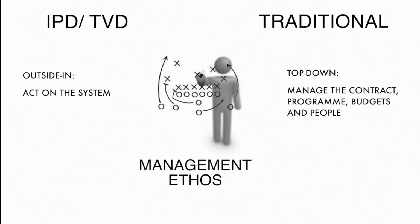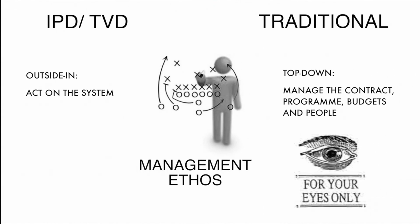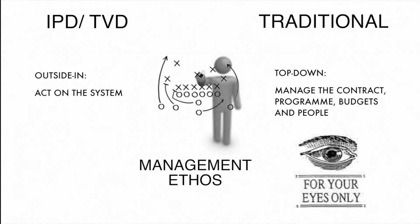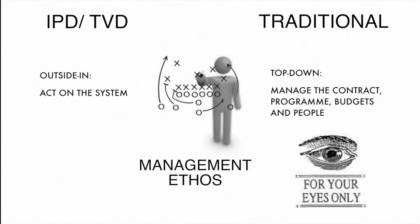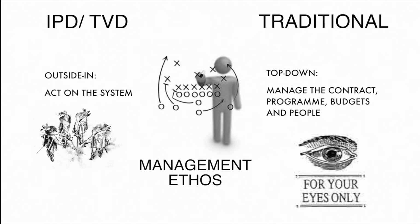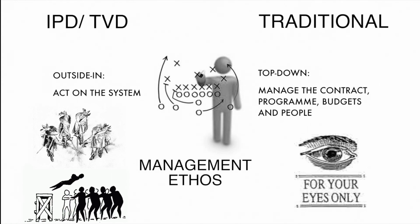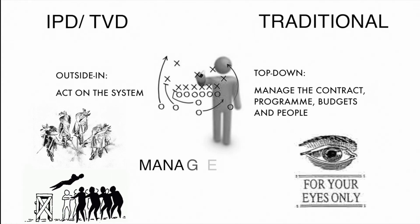Traditional construction project management is focused on a need-to-know basis, where everyone need only know what their specific role requires of them. This leads to interdisciplinary clashes at design stage and costly problems on site where no one takes responsibility. The IPD process promotes an all-for-one attitude. The system is designed so that the competent and trusted workforce know as much project information as early as possible. The messenger is rewarded rather than silenced, and honesty is key.